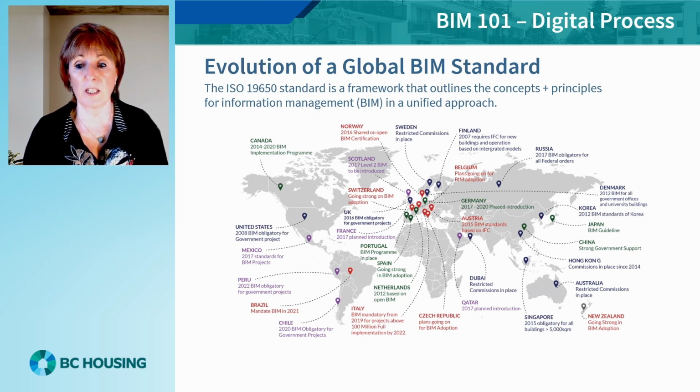Finland, for example, has mandated that all building permits be submitted in an IFC, which is Industry Foundation Class, compliant format. IFC 4.3 being the current global data standard that allows the data to be read by any compliant piece of software. It is not a question of if, change is already happening and accelerating.